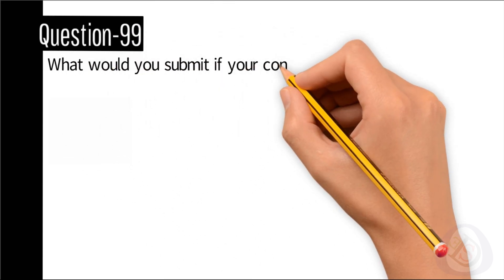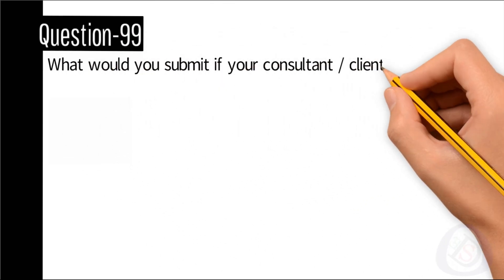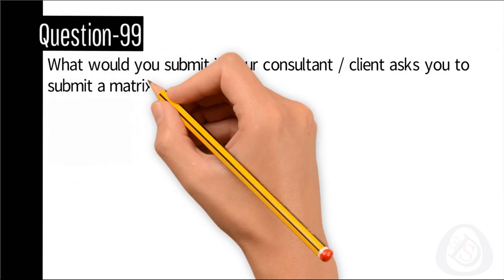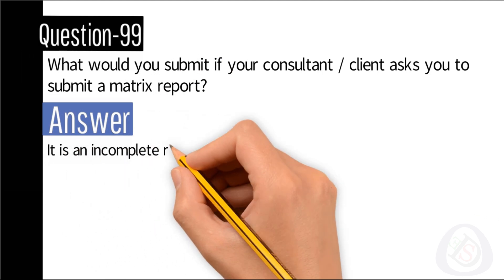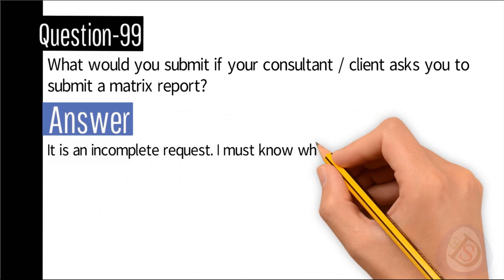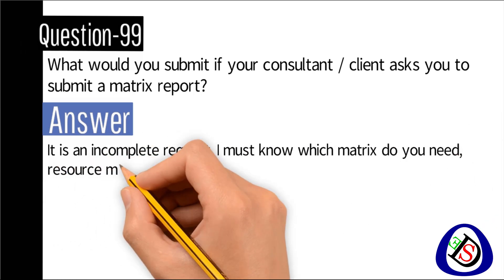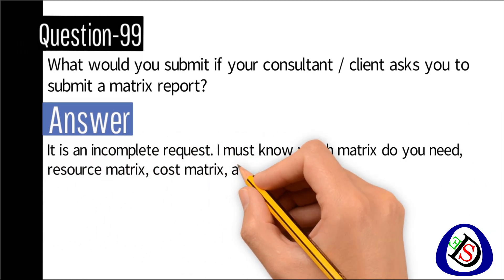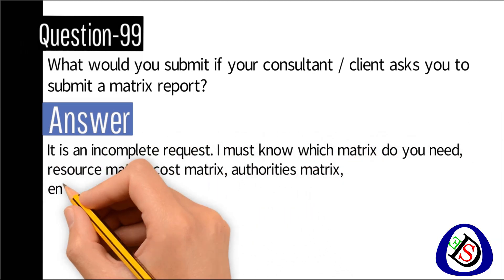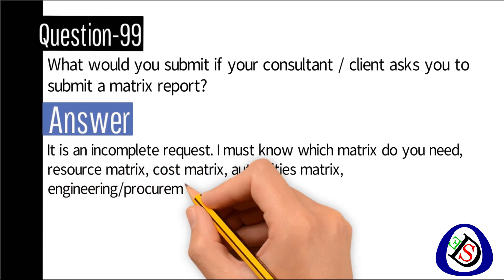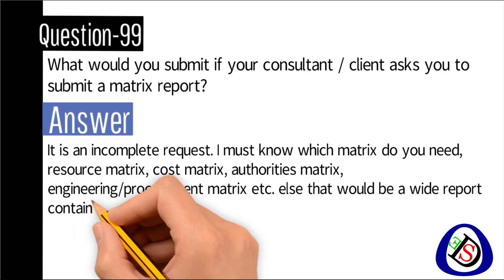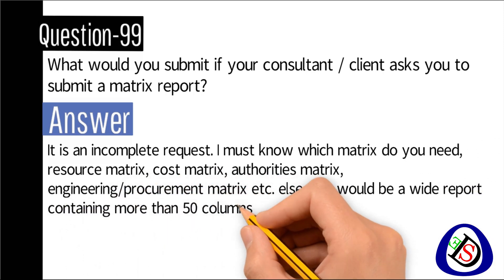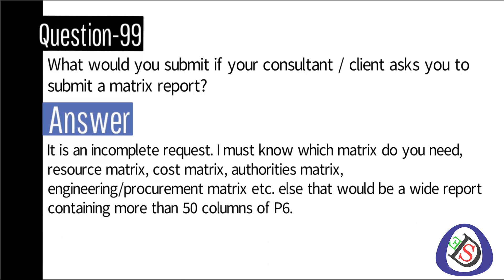Question number 99: What would you submit if a consultant or client asks you to submit a matrix report? Answer: It is an incomplete request. I must know which metrics you need — resource metrics, cost metrics, authority metrics, engineering or procurement metrics, etc. Otherwise, it would be a wide report containing more than 50 columns in Primavera.